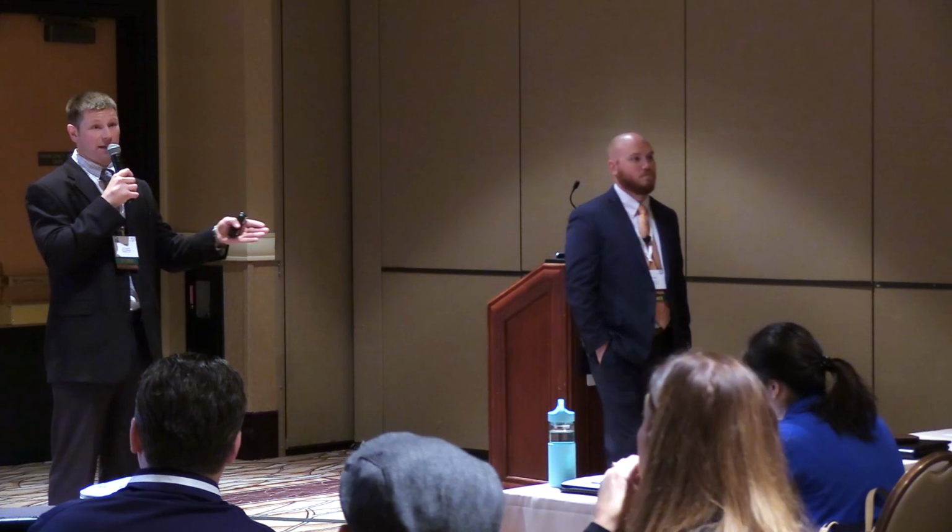So for one project, the owner did not have an existing controls contractor. So what we did is we looked at a series of projects to remedy our major findings, the things that the O&M staff couldn't fix. On the other project, they have a running contract with a controls contractor who they then brought in on our heels to fix stuff as we were going through it. They were the ones that wanted the live issues log because they wanted their controls contractor fixing things as we were finding them. Does that kind of answer your question?